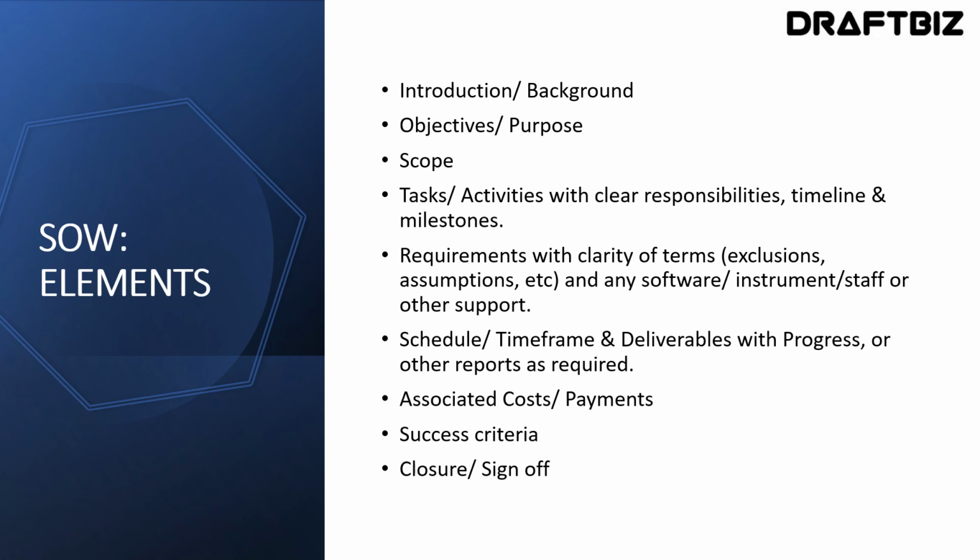Elements of SOW. Not all SOWs will follow the same pattern. However, a well-structured SOW comprises of introduction, objectives, scope, tasks with clear responsibilities, timeline, and milestones, requirements with clarity of terms and any software, instrument, staff, or other support required, schedule and deliverables with progress or other reports as required, associated costs or payments, success criteria, closure, or sign-off.